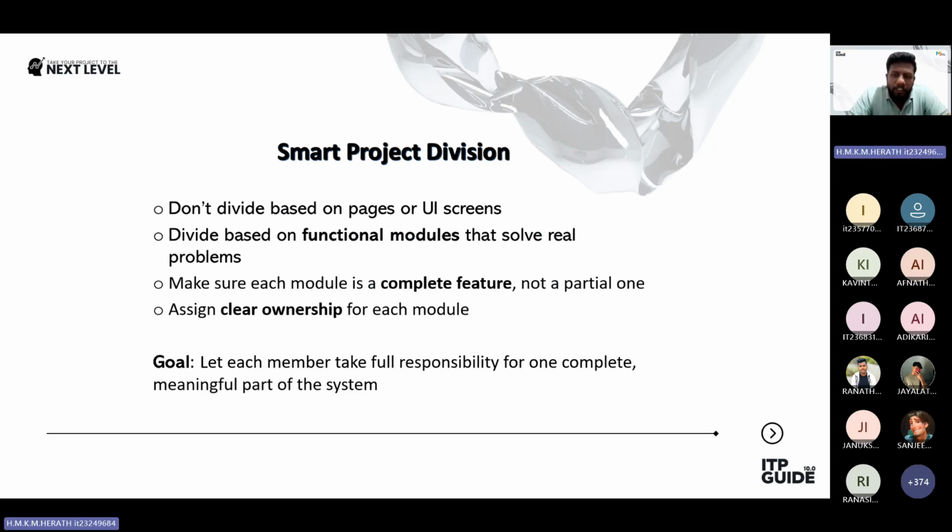Before dividing the project into parts, it's important that all team members clearly understand what the team is going to build. As the very first step, the team should identify the 5 main components of the project that can be clearly separated. After that, plan what features and functionalities should be included in each part. Try to divide the project into 5 parts as equally as possible, while it may not be possible to split everything into exactly 20% portions.